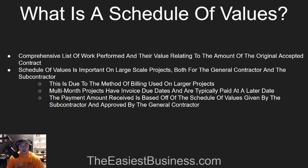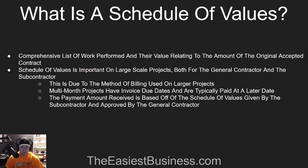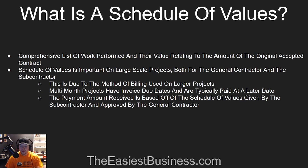The payment amount that's received is basically based off of the schedule of values given by the subcontractor and approved by the general contractor. So whatever percentage you've completed — let's say you've finished 20% of the work and you bill off your schedule of values to say you finished the walls and the trim, but still have the rest of the job — they'll pay you that 50% based on the schedule of values, whatever total that is, relative to the original contract amount.